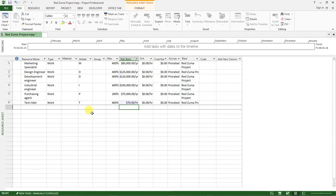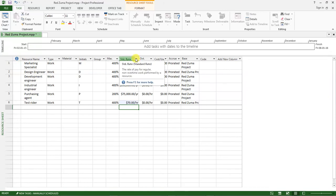Now we are done creating the resources and specifying the resource type and standard pay rates, which is the rate of pay for regular and overtime work performed by a resource.